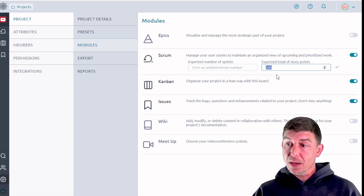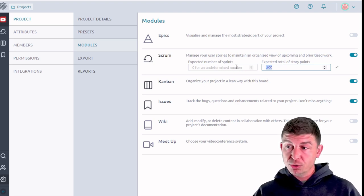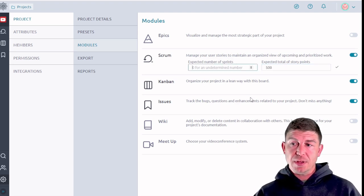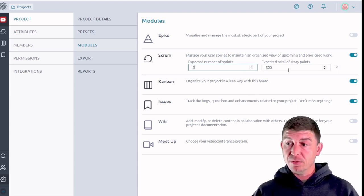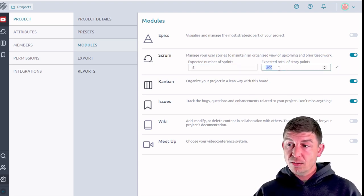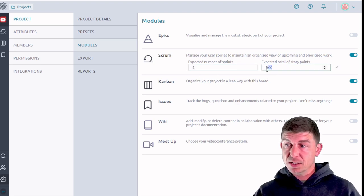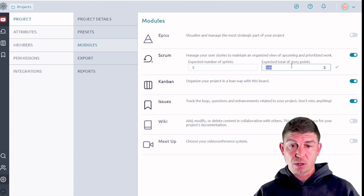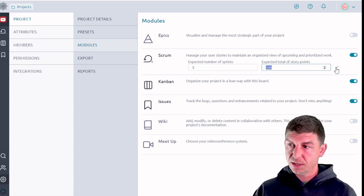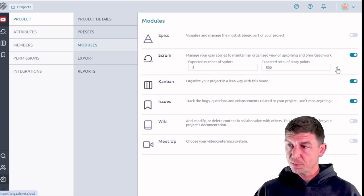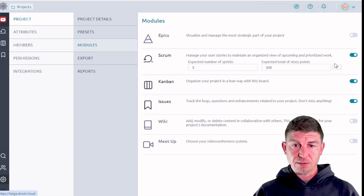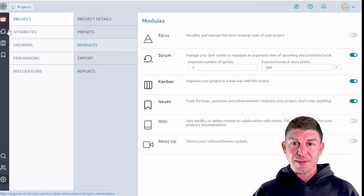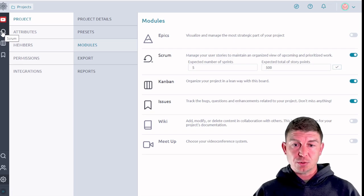But the way that I usually approach scrum is my assignment of points is based on the estimation of the number of hours it's going to take to accomplish that project. So I'm going to just for example put in 500 for total story points for the project and then expected number of sprints I'm going to put in five. So over five sprints I expect to complete 500 hours worth of work. So a sprint is 100 hours in this particular example. I'm going to click this check mark. You have to click the check for it to apply or it's not going to do anything.